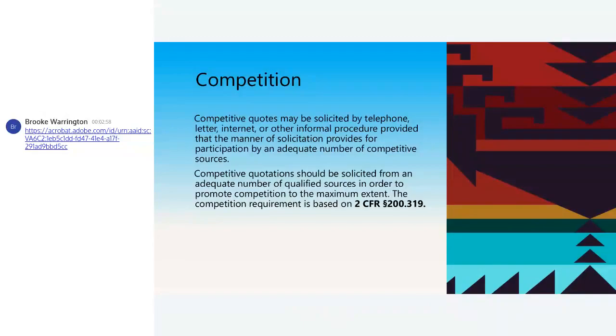A competitive quote can be solicited by telephone, letter, internet, and formal procedures provided. The manner of solicitation must provide for participation by an adequate number of competitive sources. Your competitive quotations should be solicited from an adequate number of qualified sources in order to promote competition to the maximum extent.